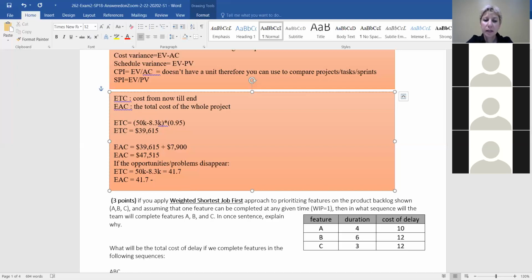EAC, Ryan. Can you write? So 41.7 is what you will need to spend from now till the end of the project, and you already spent 7.79. That's plus, Ryan, not minus. Oops. Because that's from now till the end. You've already spent some.